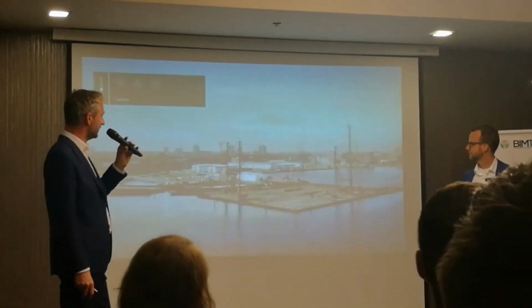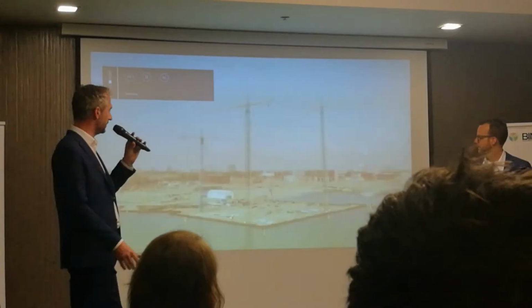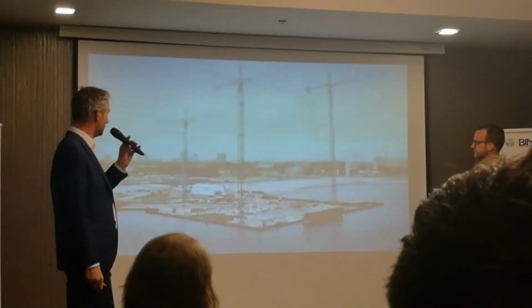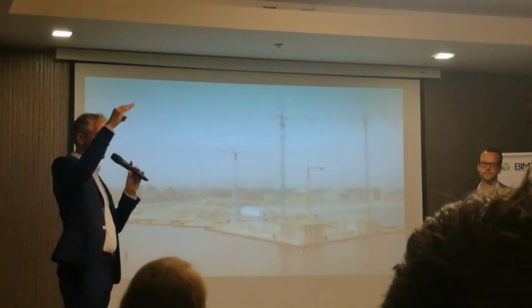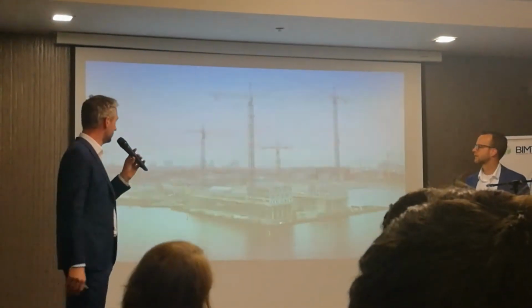So we were pumping out the water, drilling holes 30 or 40 meters deep to a sand layer because we are living in a swamp. And we're making the foundation. And after the foundation, we built 1 week a story. Every week we build 1 story extra in the towers.